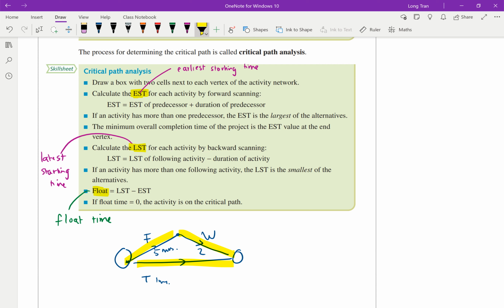Now what's interesting is in that 7 minutes, this person will continuously work. But the float time, this person doesn't have to start as soon as the other person starts. They can start much after. What's the float time that they can start? See, if it's 0 to 7 minutes, what's the latest time this person can start? 6 minutes. Yeah, that was the logic, right?